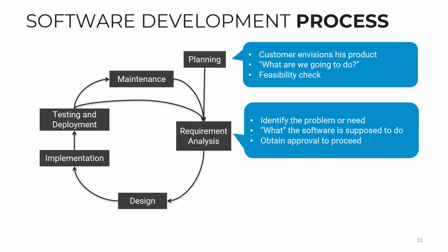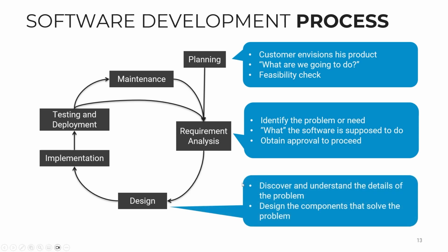If right now at the end of this phase, you realize that it is not worth it, we couldn't make it anyway, then stop here. Then maybe you just have to pay the analysts maybe 10-20% of the entire development costs. That's a loss, but not entirely catastrophic. But if after this phase, you say, all right, we're going to do it anyway, awesome, doable, then we move on to the design phase.